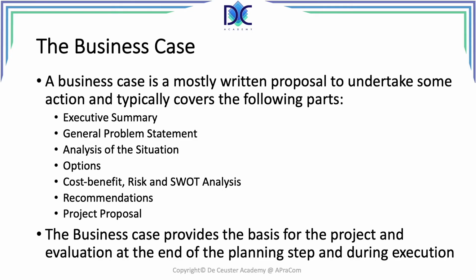It is important to verify if the financial goals are still reachable and what measures can be taken. Techniques like earned value management will provide us data related to the execution and performance of the project that can be verified with the business case. If the financial performance is not reached, the correct decisions will be made to adjust or even kill the project.